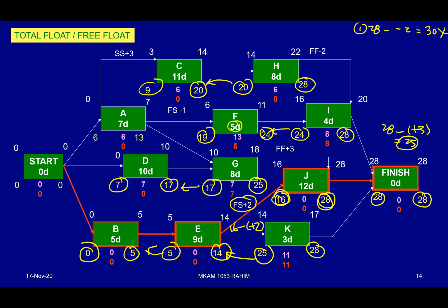If you are not careful, you might assume that there are 2 arrows going back, because these are the arrows that you can see clearly. But then remember, there is 1 arrow coming from C. It is coming from the front, not at the back. So there are 3 arrows that you need to evaluate.